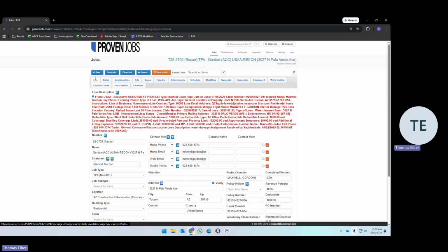Schedule adjustments are also important. Whenever anything happens with the schedule, you need to make sure that your PM's communicating that to all the appropriate parties, but they may not be interacting with Xactanalysis. So you will have to put a note in there noting any schedule adjustments or delays. Progress updates are also important. Those go into XA or Symbility. Also, we can communicate those to the client if they request. If they're not on site, if they're out of town, we give regular progress updates to our clients.